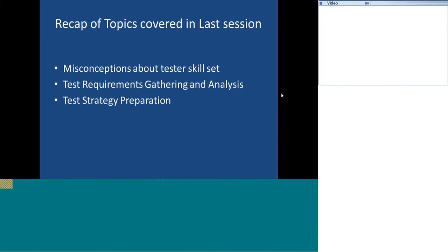Right. Yeah, you are correct. We can have the milestones at a high level. We can say that these are the documents that we are going to deliver, and these are the deliverables from a testing team's standpoint. But we cannot give the timelines in a test strategy because it is a high level document. The timelines can change at any time. So the test strategy is a static document, and that is the reason we are not giving any resource level details or resource skill set details and the schedules that we are going to follow. All these details will come as part of the test plan.